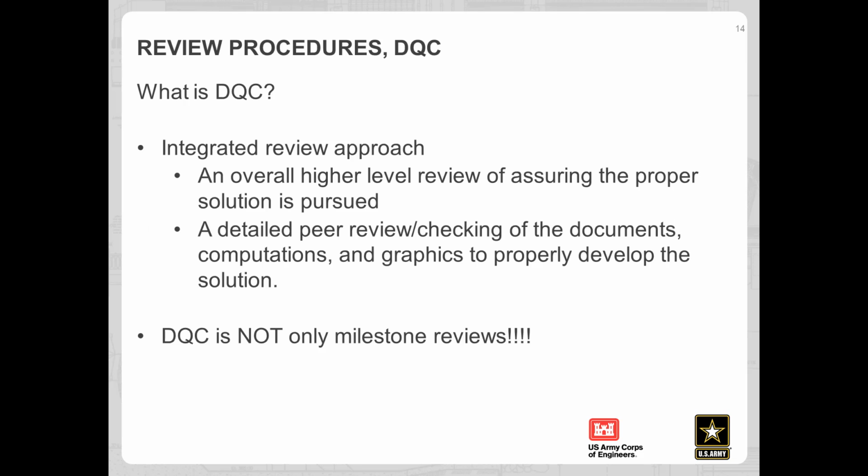Okay, thank you, Karen. I just want to talk a little bit about DQC. As I travel around the country, I get asked the question, what is DQC? And I get lots of different answers, from we check the math, to my supervisor checks it, to we do 30, 60, 90% reviews, which doesn't mean anybody looks at it. So everyone seemed to have a different definition. So we spent a little more time in this document trying to explain what DQC is. It's more of an integrated review, and it's detailed peer review checking the documents, the computations, and the graphics. It's not just milestone reviews.